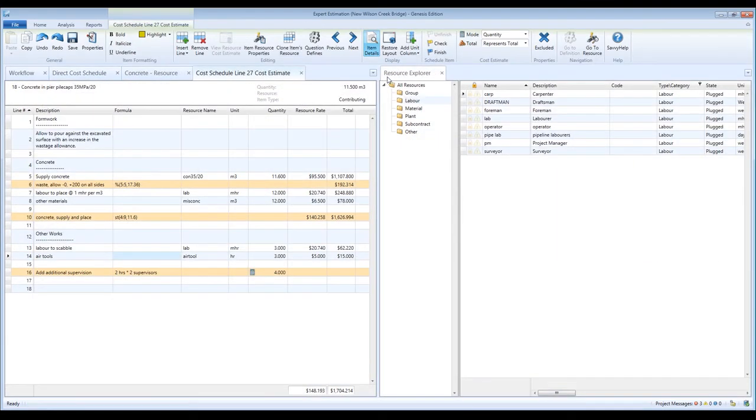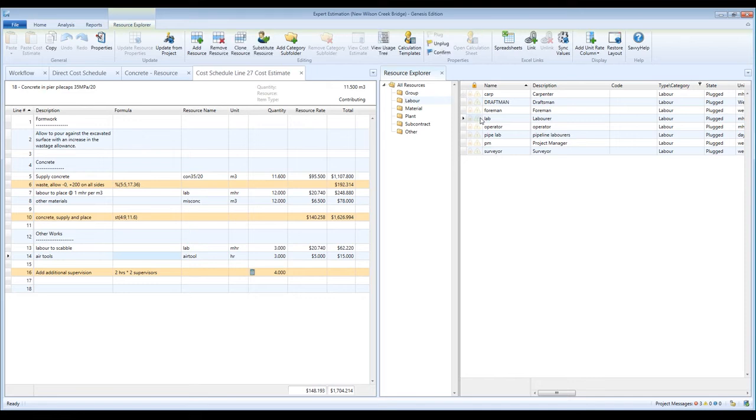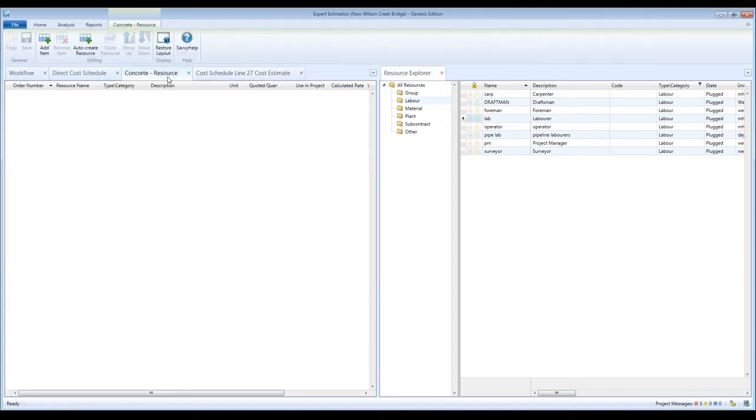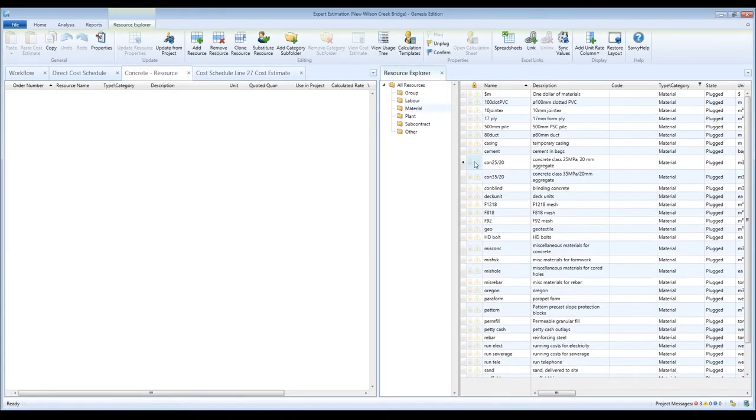You can also use drag and drop with resources to assign a resource to a schedule item or a cost estimate line. Or you can drop them onto the resource explorer of another project to copy and paste the resources. You can also drag and drop to add resources to the manage resources window in a quotation comparison.